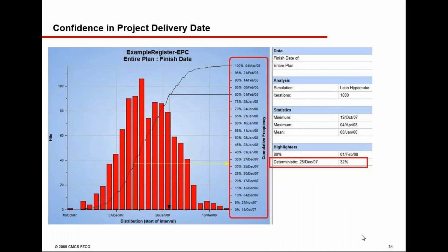This distribution graph tells us the completion dates for each and every activity over a period of time, and you have sort of an S curve, not a smooth S curve, but yes, you will get an S curve indicating the deterministic finish states, P50 or the probability 50 case, probability 80 case, 100% probability.